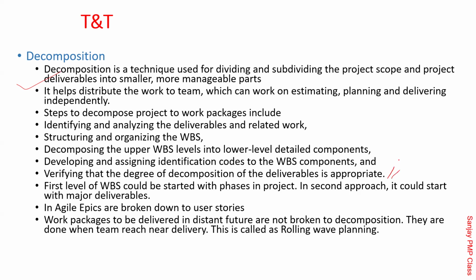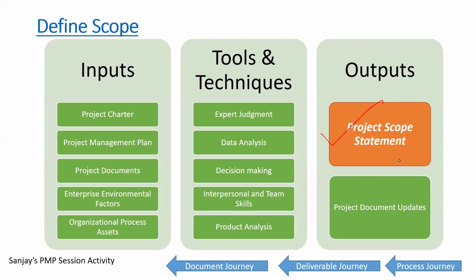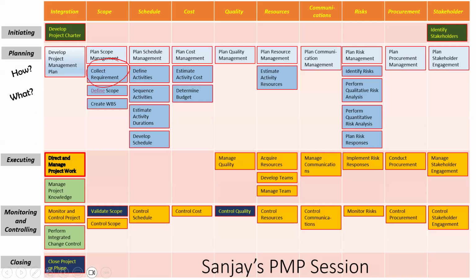This is an important concept which we need to understand. Don't decompose too much. Don't decompose too little. See, at the work package level you should go ahead and stop. Below that, the team which is going to work on it will break it down. Don't break it down to the activity. If you look at the larger picture, you will realize that you are here in Create WBS. You break something to a work package. And once this work package is done, breaking that into activities is something that developer will do. Stop at the work package.